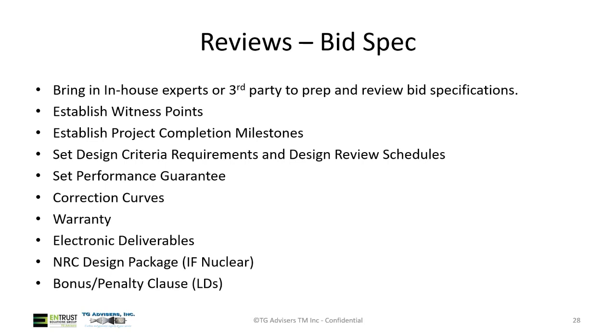He's going to go through the next couple slides. Okay, thanks, Tim. Just going to add a couple quick things to this, which tie into the next section. The bid spec is important because this is where you really set what you want out of this process. And the further you go along, the less chance you have to change or influence what you're getting out of the final product. So making sure you've got the witness points you want, making sure that you've agreed to design review schedules, everybody understands what the performance expectations and other language is.